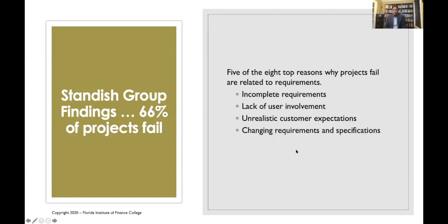Of course, changing requirements and specifications every time. Why are we sensitive on this, especially in construction, on those predictive types of projects where you have certain activities performed before you move to the next one, sometimes called a step, or a waterfall. Changing the requirements in the middle of the game has a cost. Of course, we're not saying that we cannot, but by all means, avoid changing requirements once you start your project.